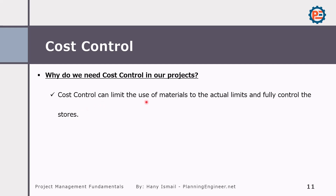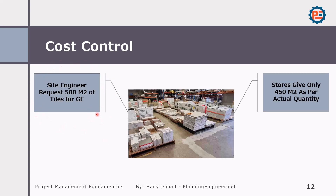Cost control can also limit the use of materials to the actual limits and fully control the stores. For example, a site engineer might ask for 500 square meters of tiles for the ground floor of a certain building. But if the project is performing cost control and there is good communication between the cost control department and the store department, the store can issue only 450 square meters — because the actual quantity for the ground floor is only 450 square meters — proactively preventing material wastage.